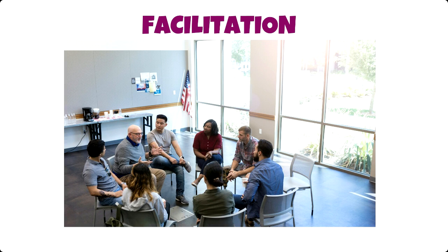One of the things that I like to do is use sticky notes and get people to think first, write their thoughts on sticky notes, and give them a nice amount of time for thinking. And then the thinkers can do their thinking. And then you can share a little bit about what's going on, and some of the people who need to talk to think can talk out loud.